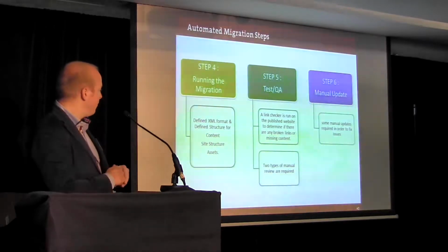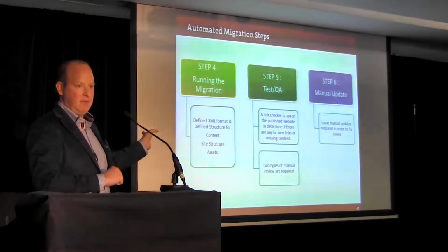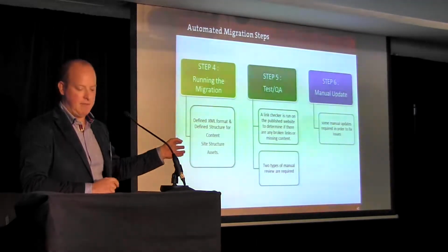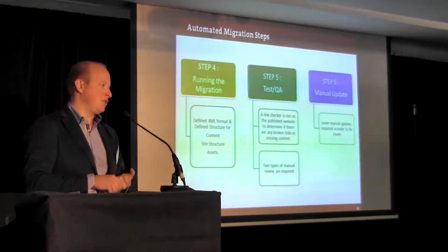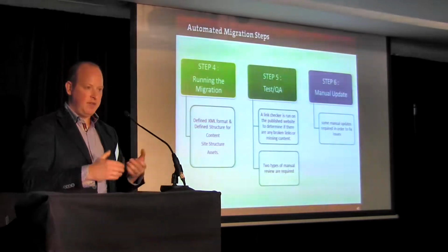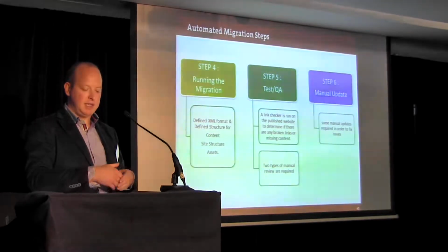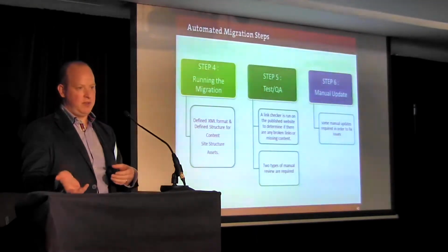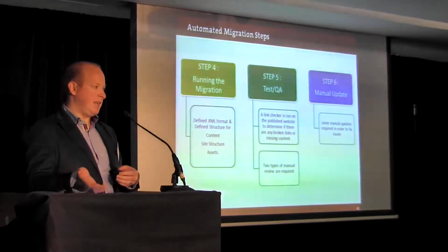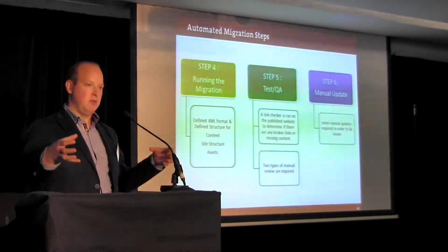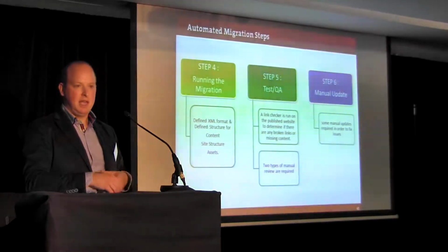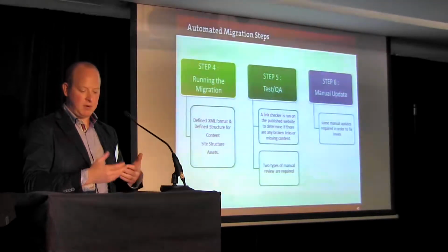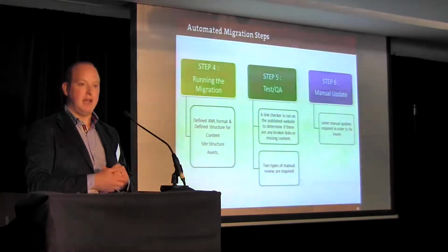Site Manager. This is where we used to be good up until, and running the migration, I would say it's all there and off you go and kind of look at your content. Where we've taken, again, another step back looking at the processes, we now put nearly more time into the QA and the testing at the end of it, as opposed to, I suppose, front loading all of our resources into the techie bit. And really that's where we would spend an awful lot more of our time now.